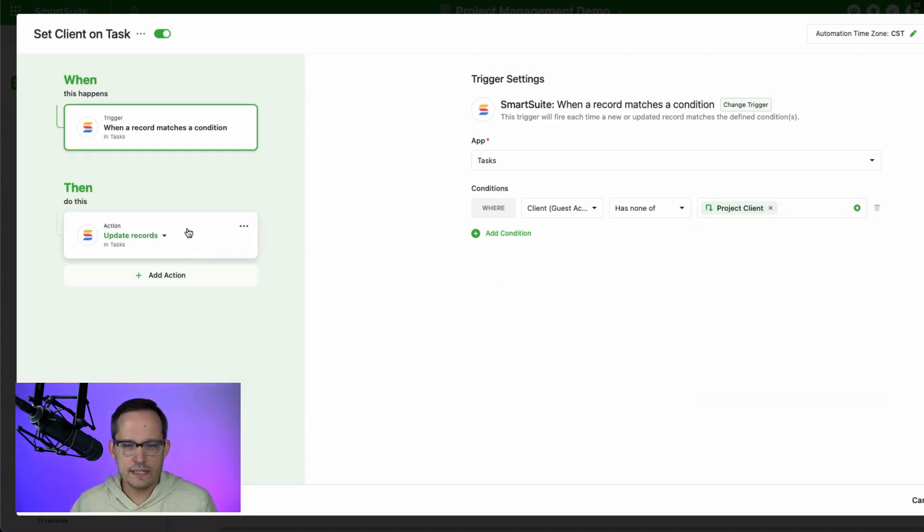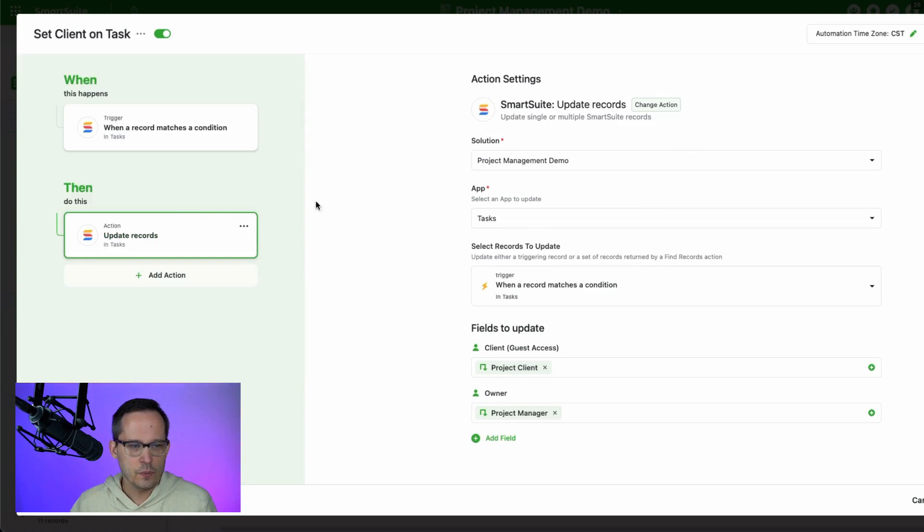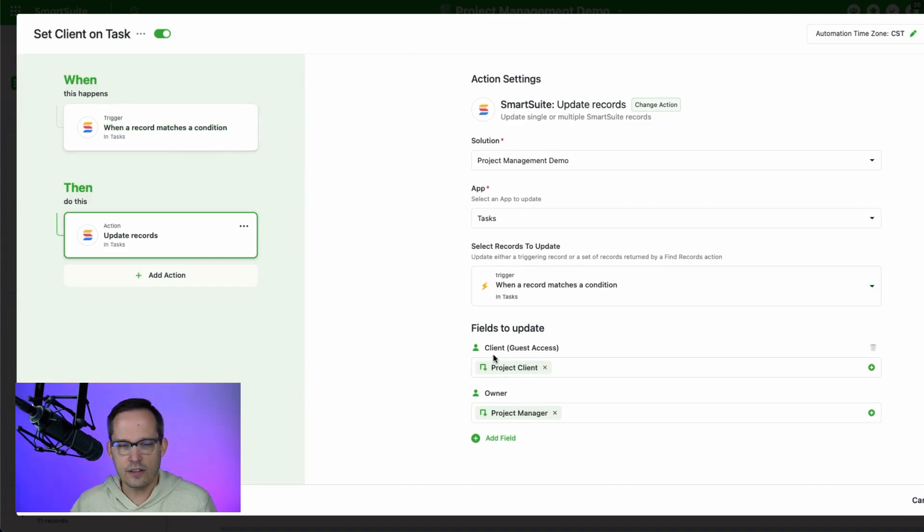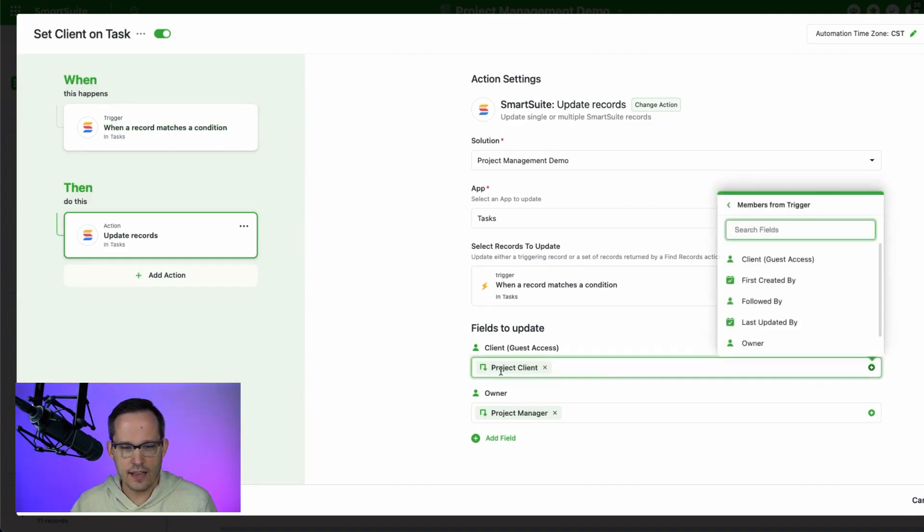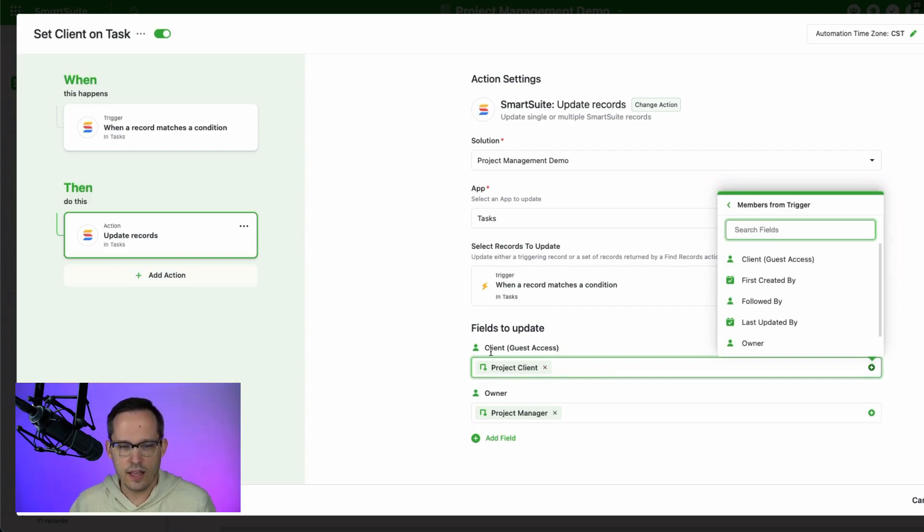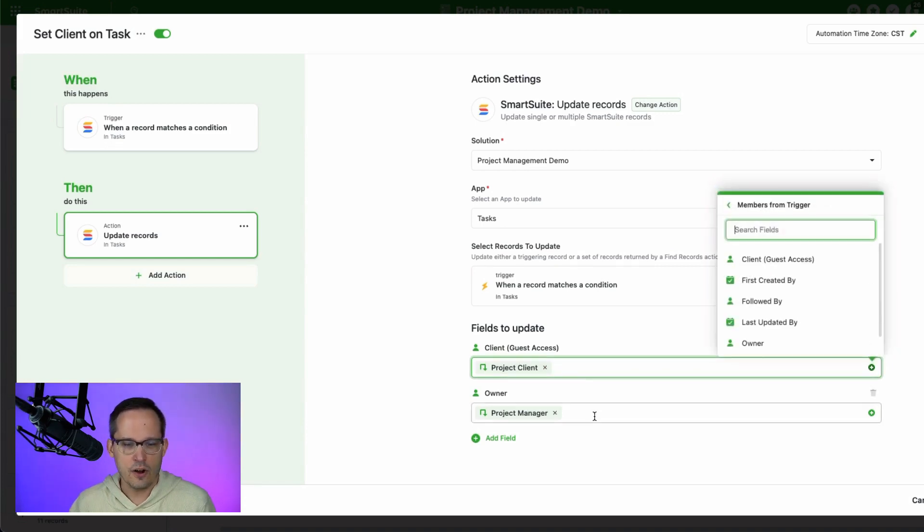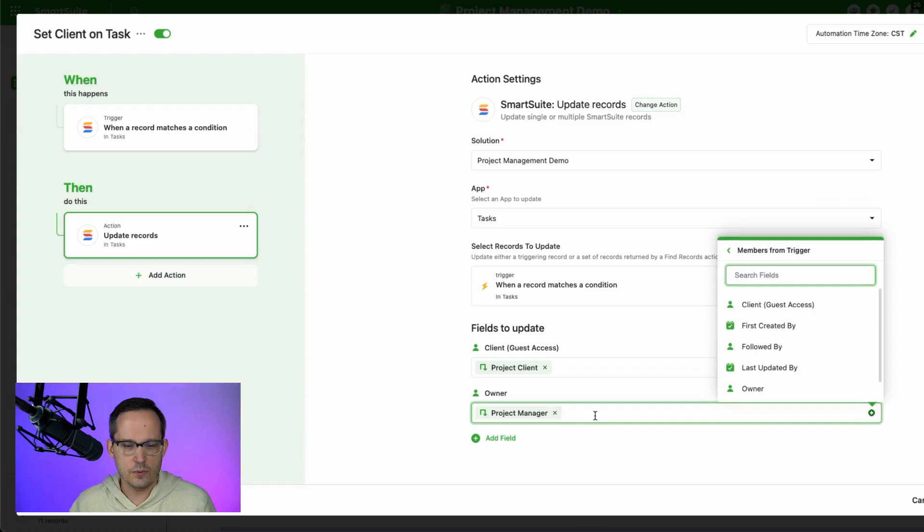And then this is a really simple automation where we're going to use this action to update the record. We're going to update the same task that was the trigger in the first place, to say now our client is equal to the project client. Remember, this is coming from that project level. So our client guest access is equal to the guest access project client from the project level, and our owner is equal to the project manager or assignee on the project level. I know that's a lot of information, but I think for some of you who are doing a lot of powerful things with automations, this will hopefully provide a little bit more clarity behind how we can set up those forms and create the automations to link this all together.